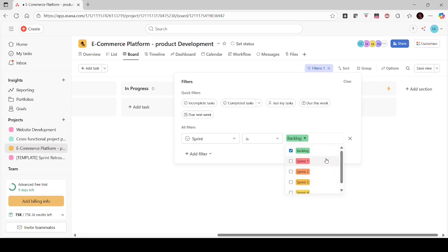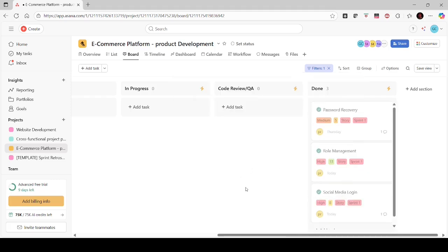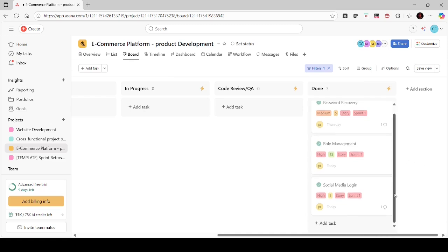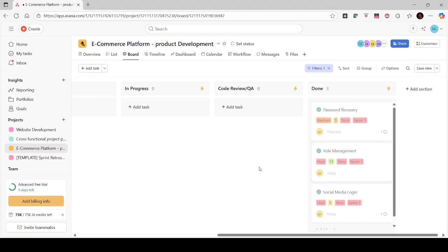In that case only backlog or sprint 3 items will be displayed in the board, and from the done column you will be able to easily identify which items of sprint 3 are complete now, and we shall conduct the demo based on that. But as currently we are in sprint 1 only, I have given the filter as backlog and sprint 1. So we have taken 3 items for the first sprint, and 3 are completed. Based on that the demo will be done.